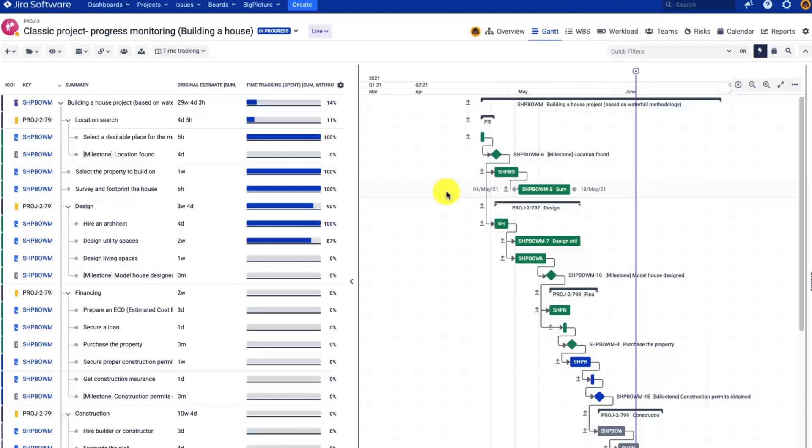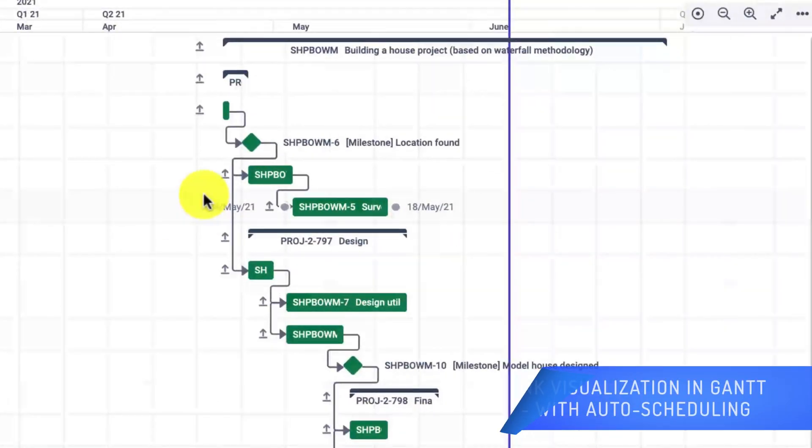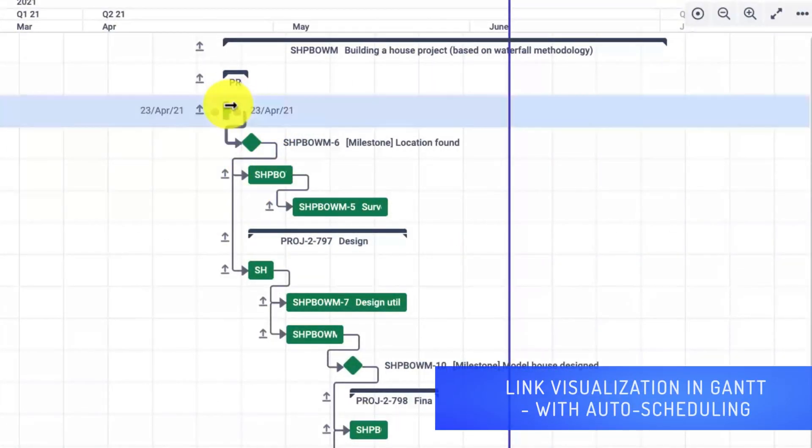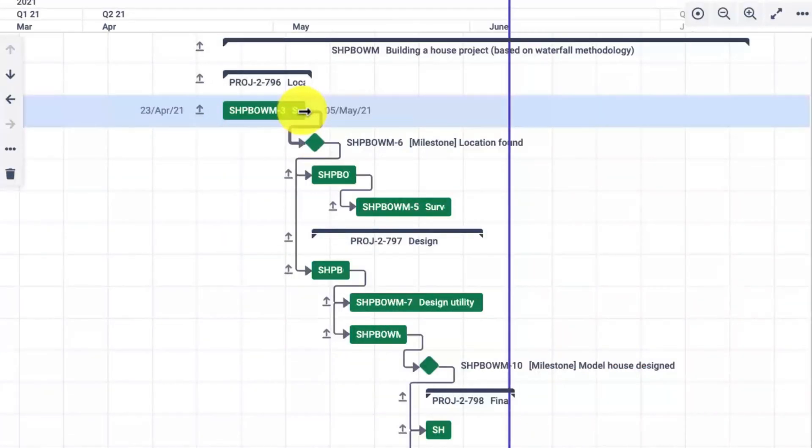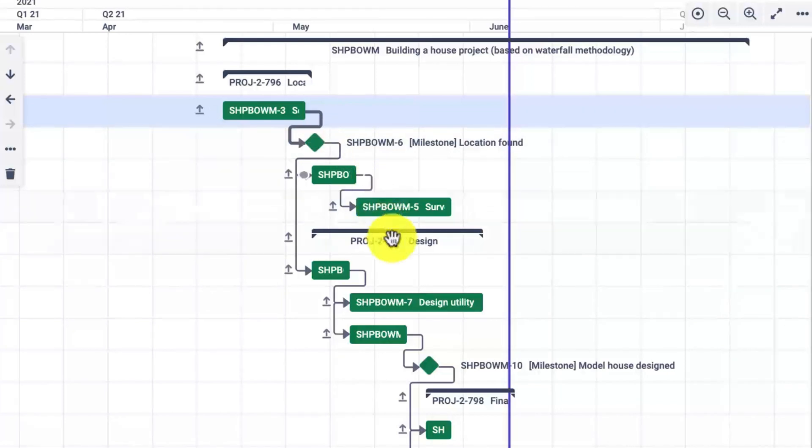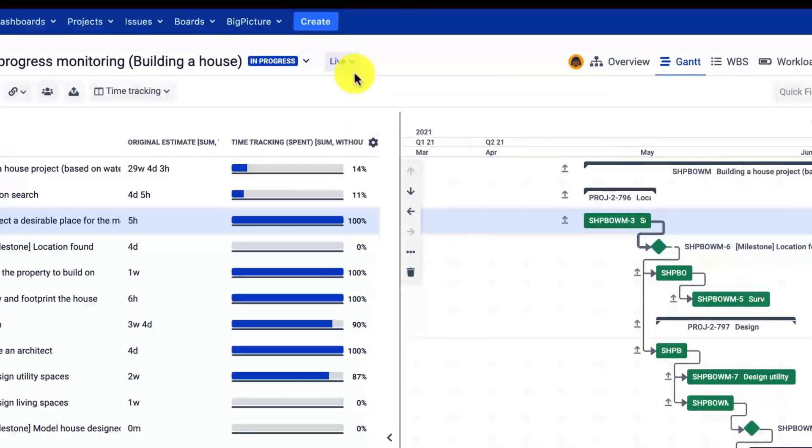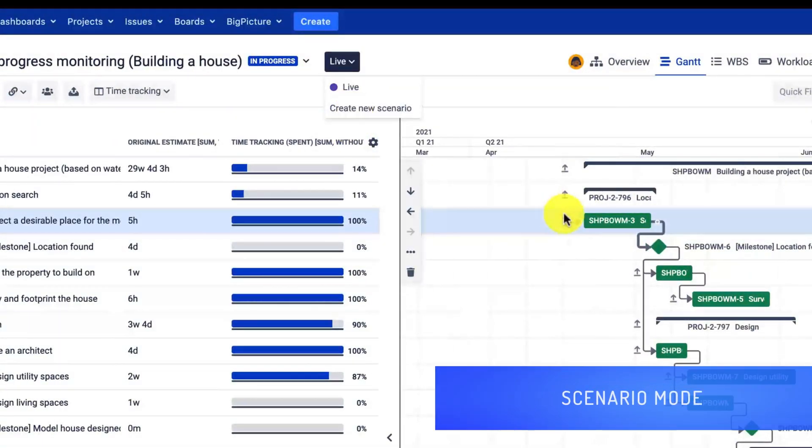Before we start, please have a look at the timeline. Right now I'm using auto-scheduling, and as you can see, a simple drag and drop can actually reschedule all your linked issues. Now this could be a problem, but we do have a scenario mode and I recommend using it. Whenever it is enabled, you will be able to undo all the actions.